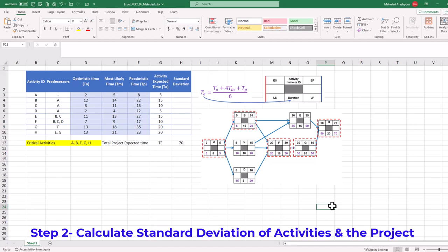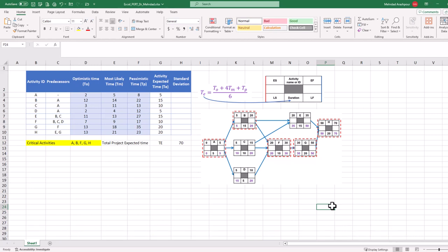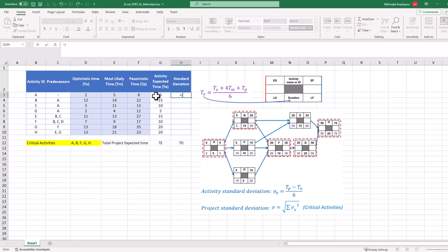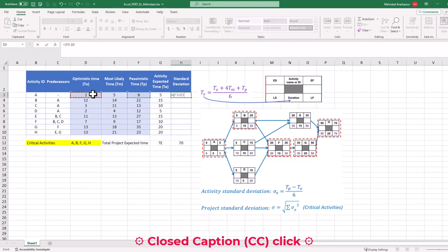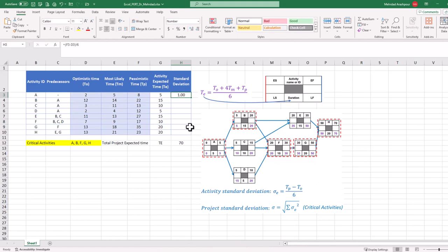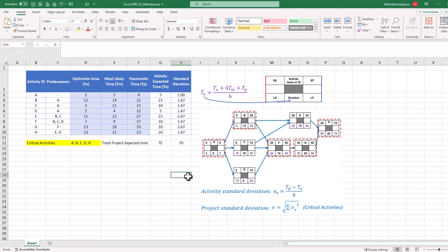Step 2 is to calculate a standard deviation of activities, or sigma E, and a standard deviation of the project. We start with activity A to find its standard deviation or sigma E by using the formula below our CPM. First, we click on the relevant cell and press the equal sign. Then in parentheses, we enter pessimistic time minus optimistic time. Finally, the result is divided by 6 to find the standard deviation for activity A, which shows how spread the duration range is around its most likely value. The formula is duplicated for the rest of project activities to find sigma E for all.